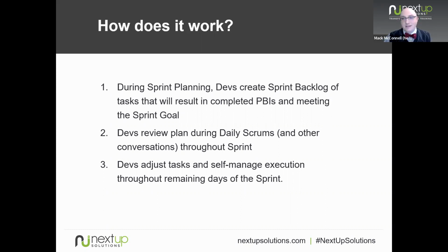And the short answer is, I don't really think it's worth doing. So the whole point of estimating is as a forward planning tool. We think this backlog item is small, we think this one is big, and together we can use our guesses about size, which include effort and complexity and risk, to, as a team, hopefully come up with a practical guess as to how many things we might get done in the next sprint's worth of time.